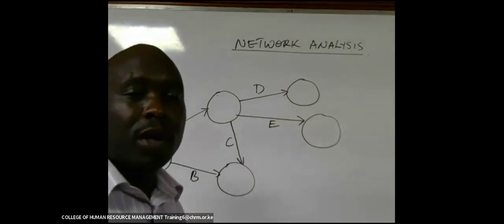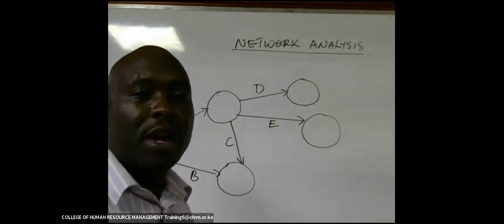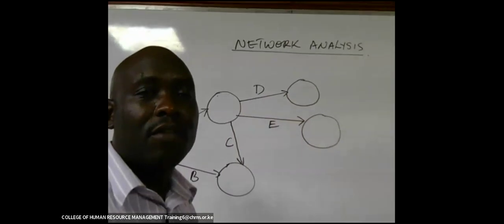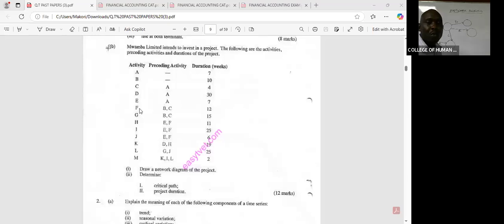We continue. Just move procedurally like that. We have done E. Now we are at F. F will start when B and C have been completed. The same case with G. G also starts when B and C have been completed.